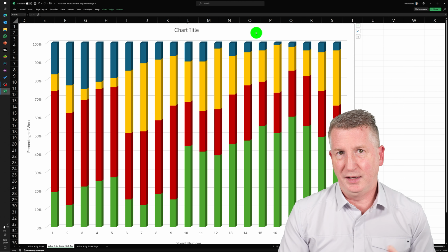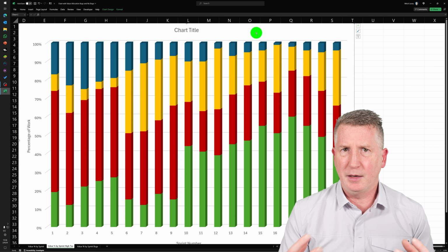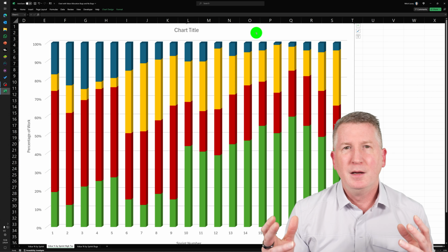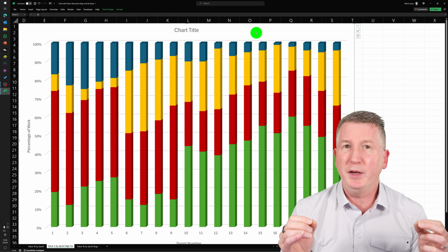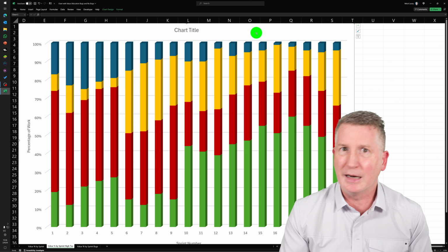The reason why is this. It was a C# SQL project with a database component backend, but that database stuff was pretty small, say 10 to 20%. We were spending upwards of 70 to 80% of our time every sprint simply dealing with the SQL and database people. They wanted to know everything before we did it, before we thought of it, before we wrote a line of code. It had to all be approved. So there was a lot of overhead because we were constantly meeting with them to talk and talk and talk and talk, but we never really did any work.